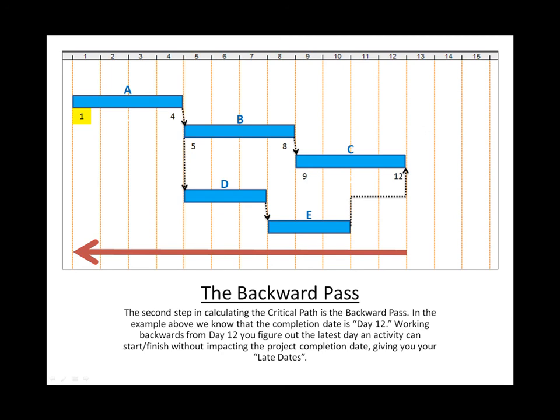If we jump down to activity E, you can see its late finish is twelve and its late start is ten. D is nine and seven.